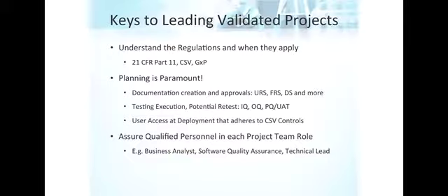So testing, execution, and potential retest: experience will quickly tell you, and I'm here to tell you, add buffer into your schedule for anticipated delays due to failed test scripts. And those might be required to be remediated before you move on. And who knows how long that remediation could take. So even if the go live is needed by a certain date, you can never really be too sure that you're going to hit that because you may encounter last minute things with validation. So the QA process of validation is more important than meeting your go live because of the audit possibilities that Ron just talked about.